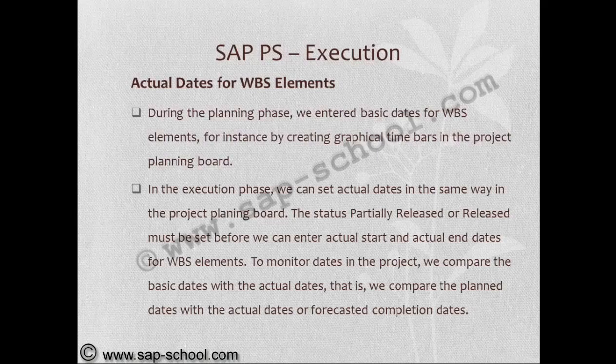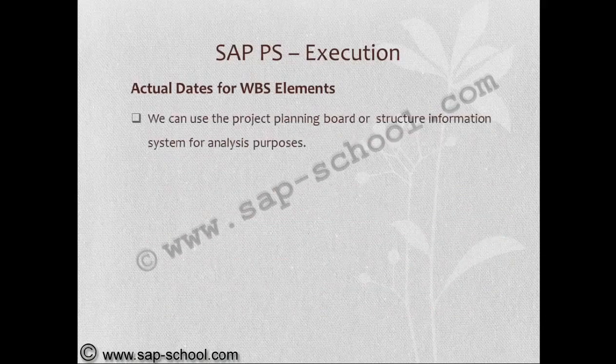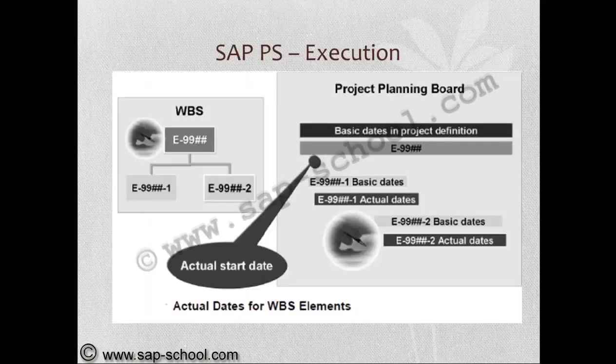To monitor dates in the project, we compare the basic dates with the actual dates. That is, we compare the planned dates with the actual dates or forecasted completion dates. We can use the project planning board or structure information system for analysis purposes. So here in the project planning board, we set the actual start date that will be compared with the basic dates.